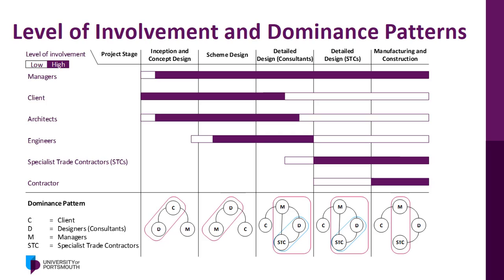The project manager has to understand what happens, what are the expectations at each stage, whether there is a disruptive or integrated project organization. Example, are the architects dominating the consultant detailed design, while it should be by the managers? What happens often is that the architects, being the face on the project, know a lot more about it than the managers who get involved later in the process. For the project managers to fulfill their role, it is crucial that they thoroughly inspect the project once involved and take full responsibility and control of the process.